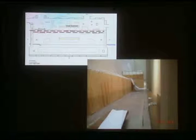Once all the art had been moved from under the mezzanine galleries, the area below the fascia wall, so here's the fascia wall right there, and this is now all emptied out, it was tented with double rows of plastic and also a solid temporary framing wherever demolition was scheduled to happen. So you can see all this, the plastic, and this is where some of the casework came out beyond the fascia wall. The museum's engineering department worked with the construction crews to ensure that most of the dust would be collected or pulled away from gallery spaces.